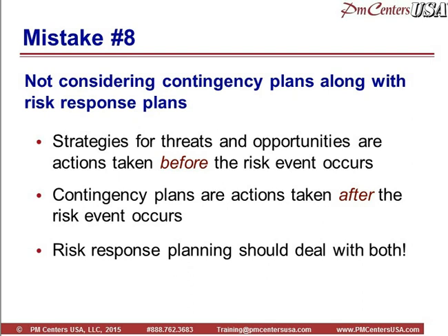Now, obviously, if the weather is nice, which can happen, I don't need it, so I'm not going to do it unless it's needed. So I'm going to watch the weather forecast, and when it's time to do the work, if we see sub-freezing weather, the risk event is going to occur, which is bad weather. We'll implement the contingency plan. We'll get the plastic sheeting. We'll get the propane heaters, build the structure, and continue working. So this is the point: you've got to consider both risk response plans and contingency plans.